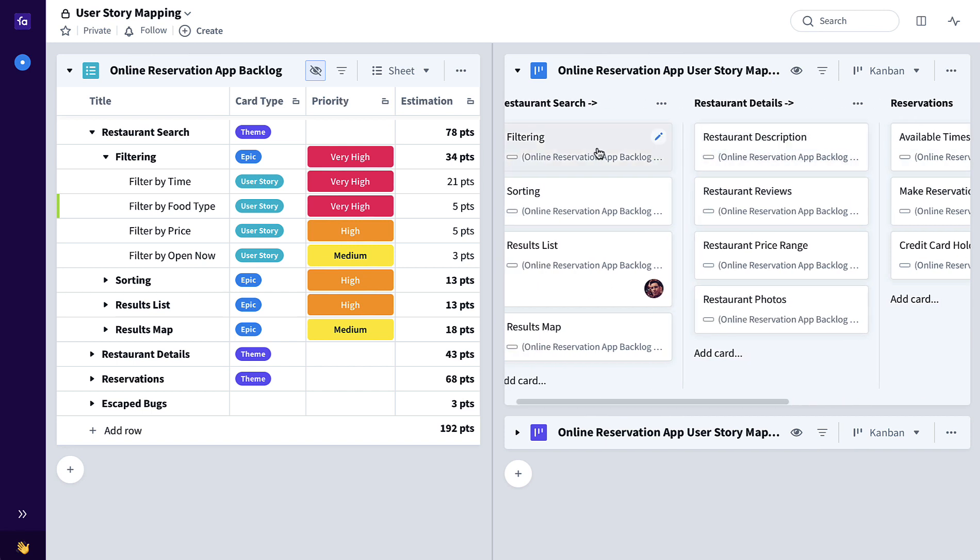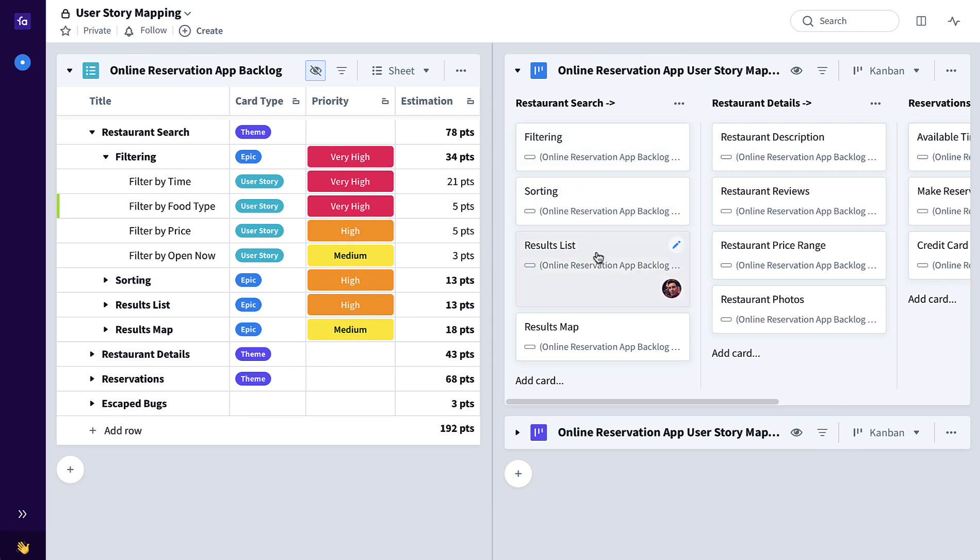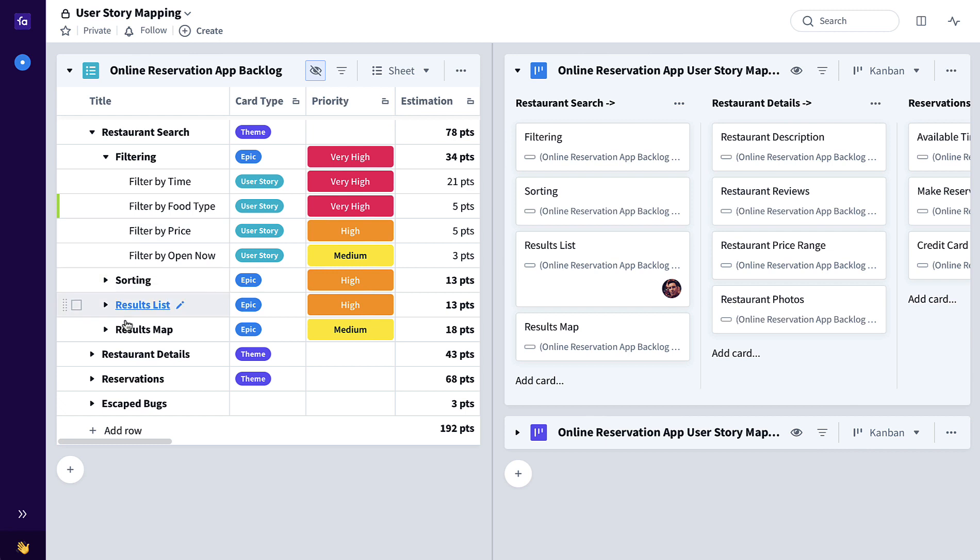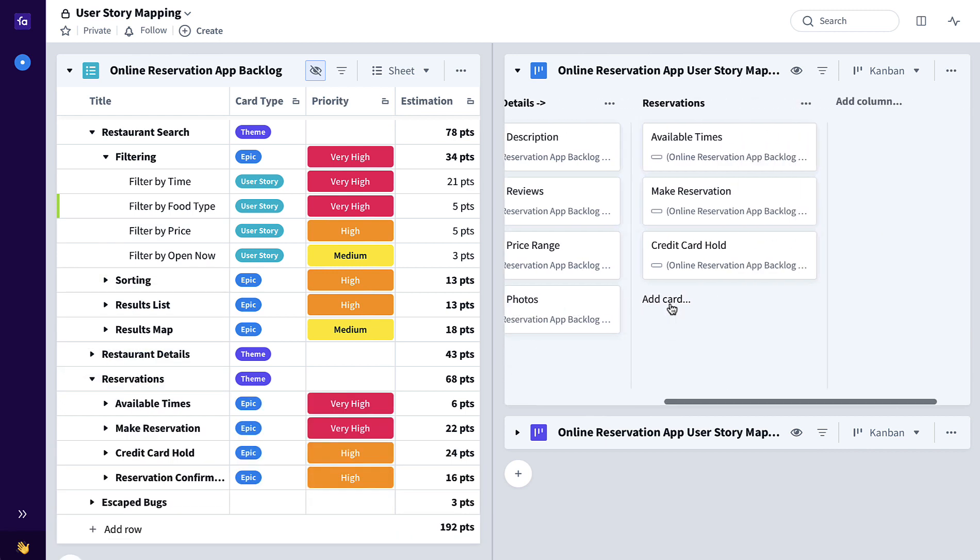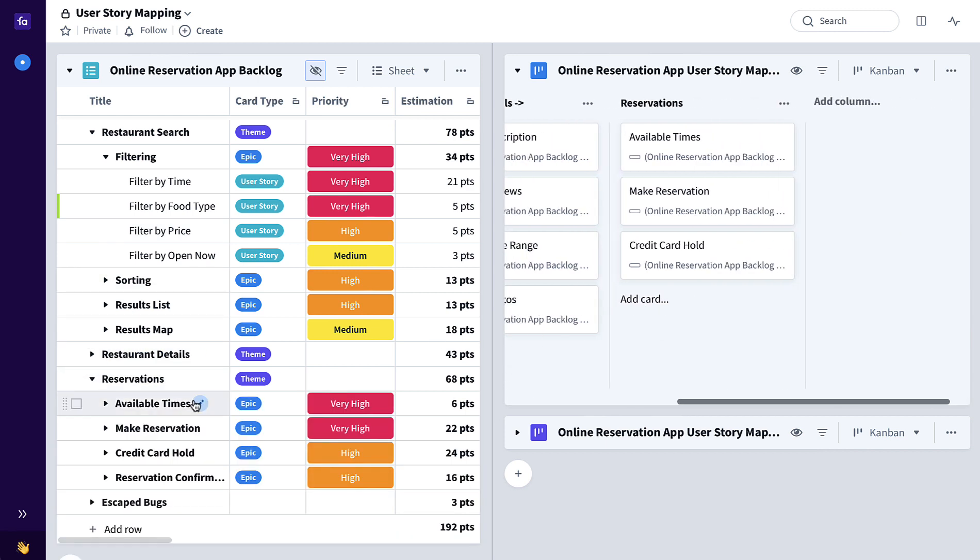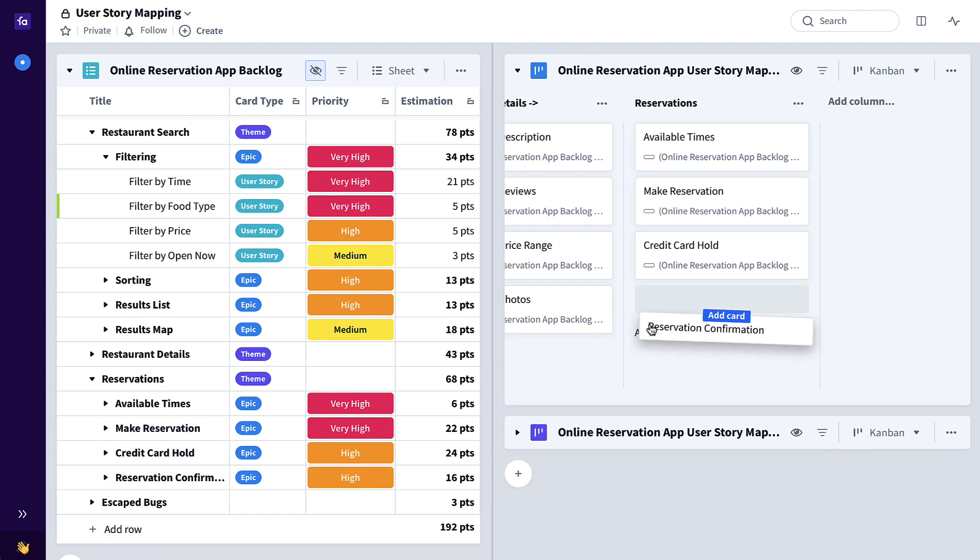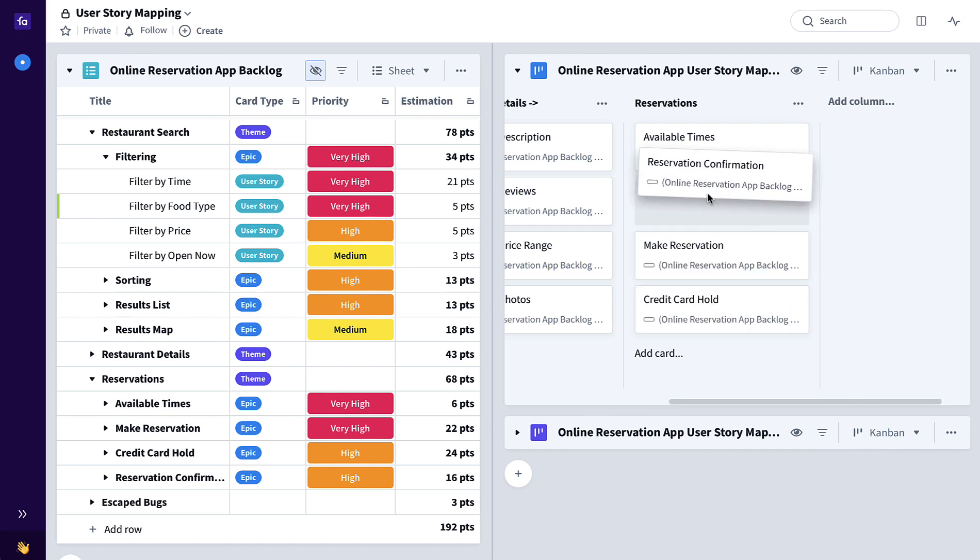These epics are added from the backlog to this user story map and that's as simple as doing a drag and drop like this. If we wanted to prioritize reservation confirmation a little bit higher, we just drag it up the list like this.